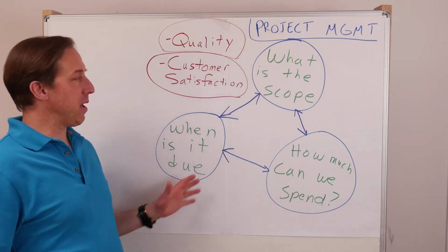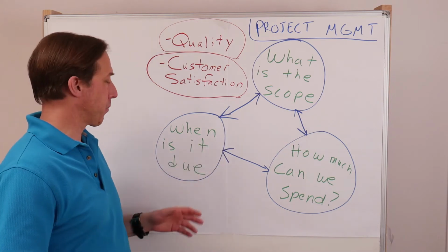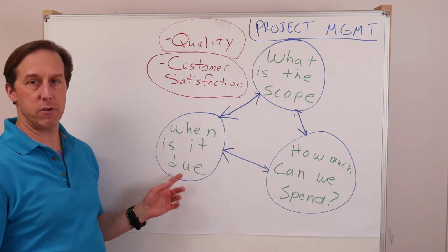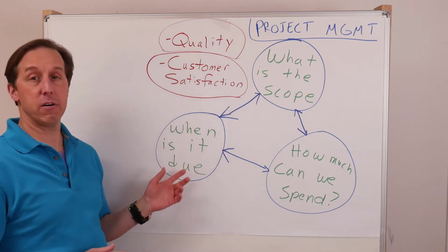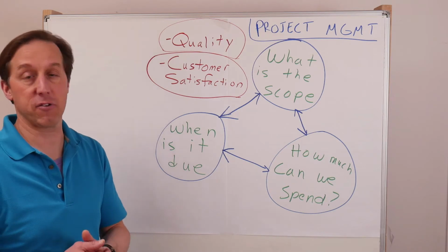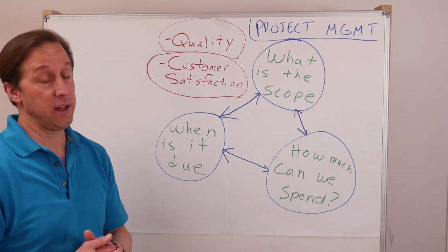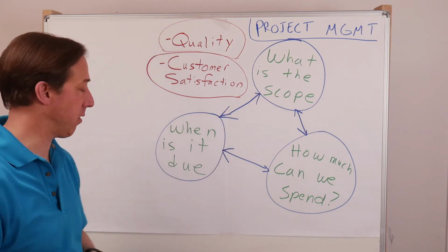But again, the three fundamentals are, what do we actually have to achieve? What's victory? Our time frame, when is it due? What pieces of it are due at what point? Also for here, what programmatic or design review type tasks are due when? Okay, that's part of the scope. If we have a bunch of design reviews, that has to be added into our estimate.